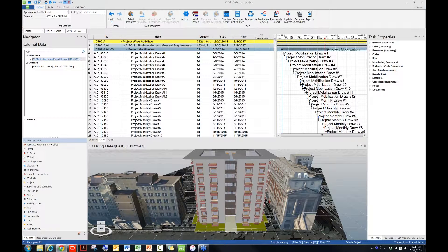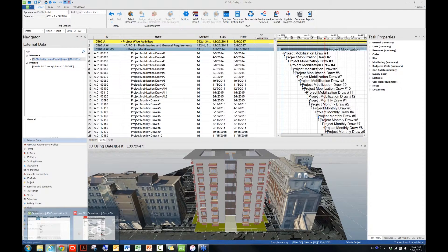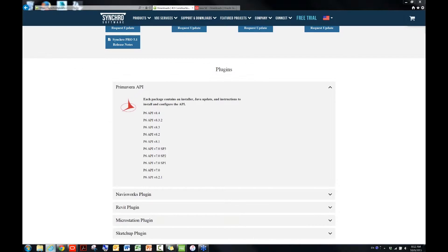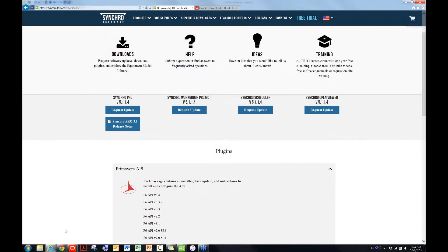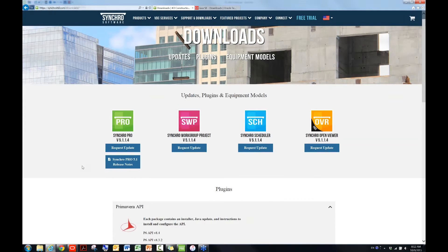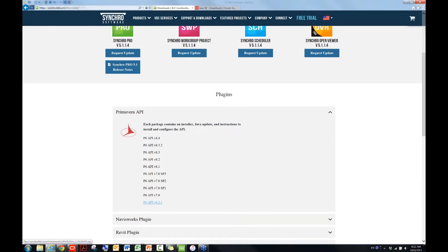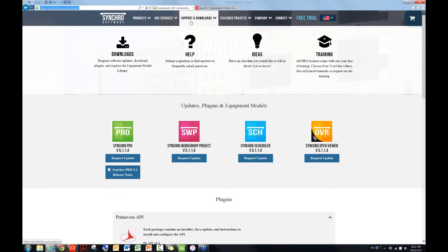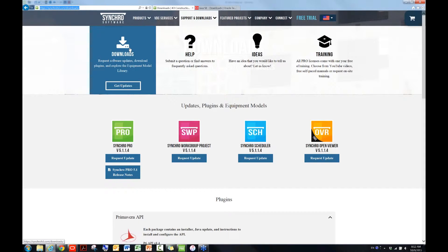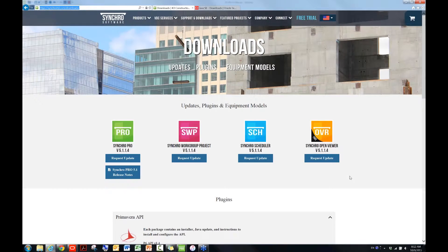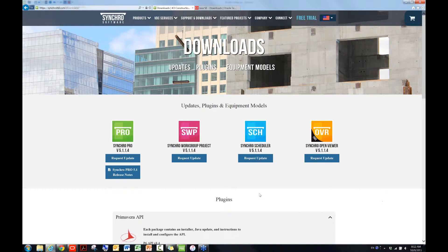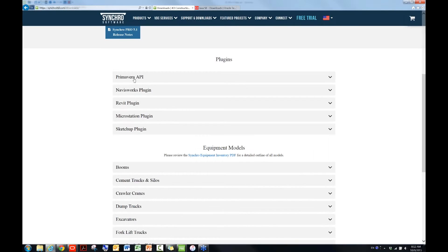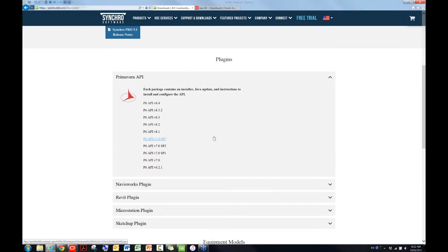Okay, so the P6 API download can be found from Synchro's website, which I have open here, I think. Yeah, so if you go to SynchroRTD.com and then go to this page, support it in downloads, and then under downloads, you should be able to find underneath the section plugins. Here, the first one is the Primavera API download. Please note that both P6 and API must be the same version. Any instruction can be found in Synchro Help.